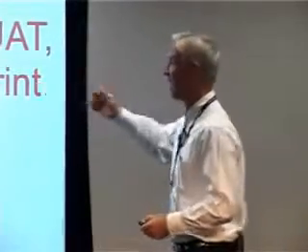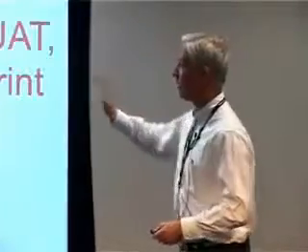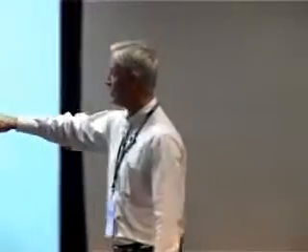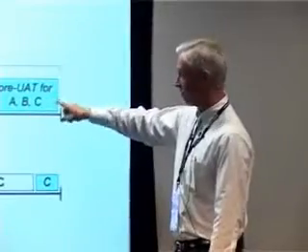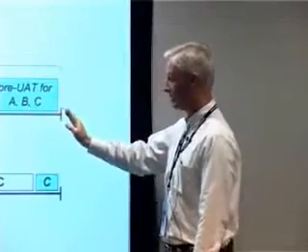And if that's the case, certainly do your UAT each sprint, because in Scrum you want a potentially shippable product increment at the end of every sprint, which implies you're completely done every sprint, which implies all UAT is done each sprint. And don't do the UAT just once at the end of the sprint.